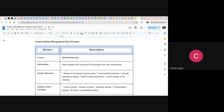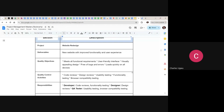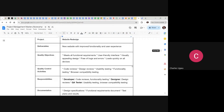First, you need to capture the project name — here we're using 'website design' as the project name. Under deliverables: new website with improved functionalities and user experience. The quality objectives include: meet all functional requirements, user-friendly interface, visually appealing design, free of bugs and errors, and load quickly on all devices. These are the key quality objectives — the quality has been stated.